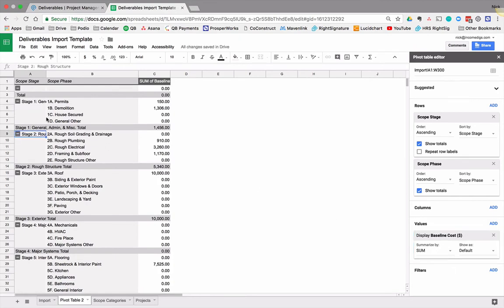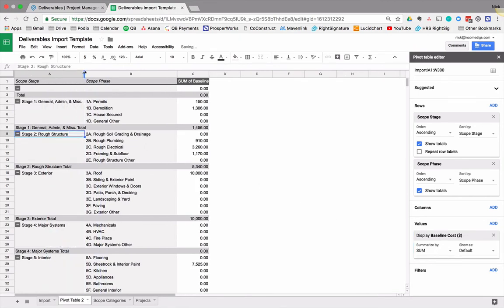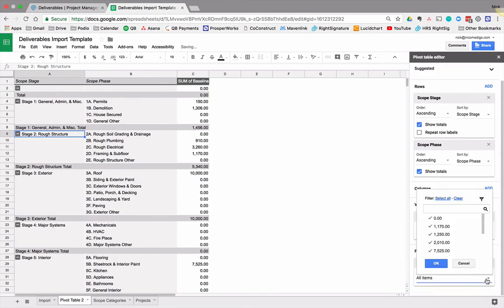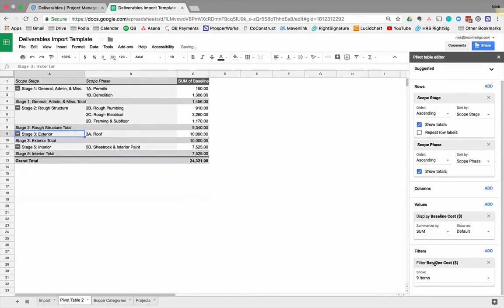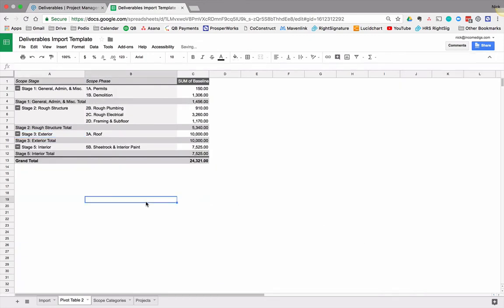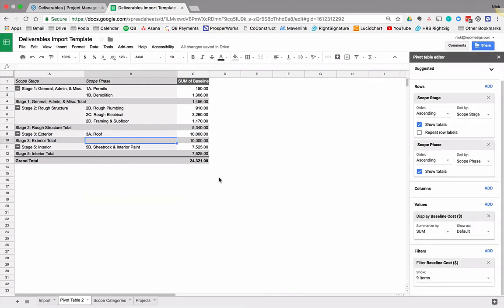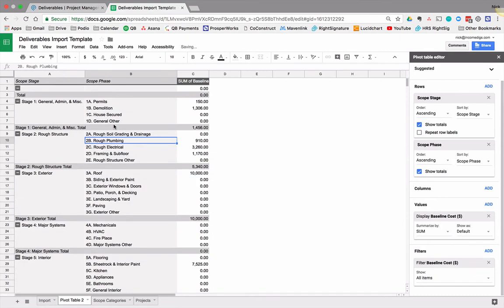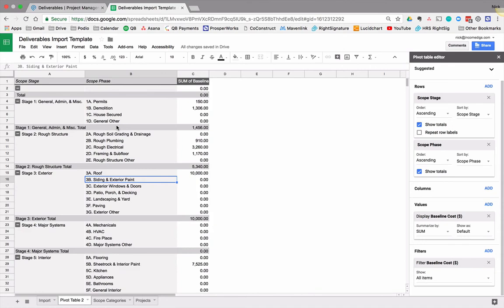And then where the real magic happens is in the values. We start bringing in the baseline cost. So this shows us before we even import into Podio, we can work with our team and say, this is going to be our initial scope. What do we have for all of these stages and phases? We can also add a filter. If we don't want to include anything that has a zero, we can go ahead and do that and it'll make it nice and neat for us. But if we include the zeros, what's nice about including the zeros is again, it forces us to think through all this stuff. Like we got zero budgets for all this. Does that make sense? Are we not doing any siding? We need to go and make sure that budget's filled in. This is an awesome way to force yourself and your project manager to think about projects and budgets before you get started. So this pivot table is great.